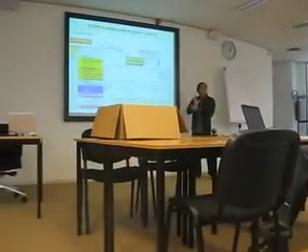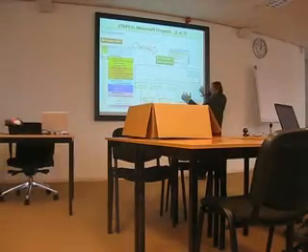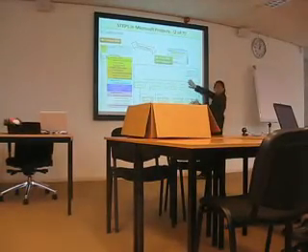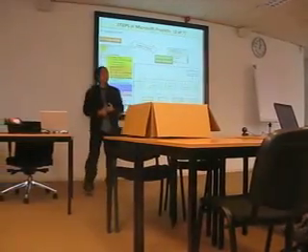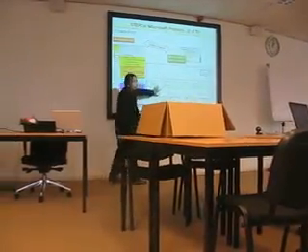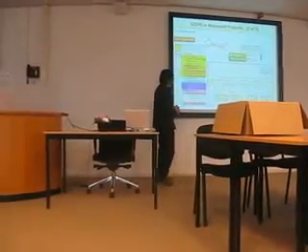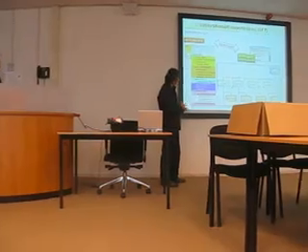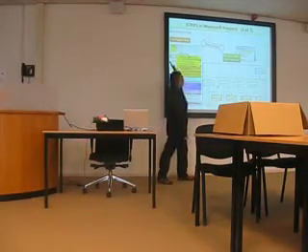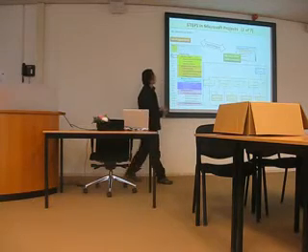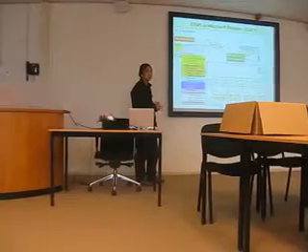But you can also do it the other way around: you do the work breakdown structure in Visio, and then export it again to Project. It's a different way. But normally we do the WBS first, and then we import and export. If the WBS changes again, you can change it, then export and import again. It will update automatically. It's very fast, very easy, but we have to buy Microsoft Visio.